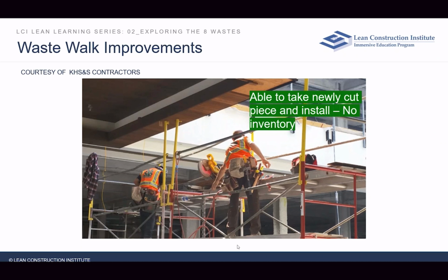Now, one of the things I would challenge the team in the first example was go to these workers and say, what can I do to make your job safer and easier? And my hope would be that they come up with ideas like this. Hey, what if we build a scaffold and put our tools up there, and we could just work along this entire line without ever having to change our work environment? They can build this entire soffit from this set of scaffold. We can probably do this whole thing in less than a day. It's beautiful. So we have no inventory now.